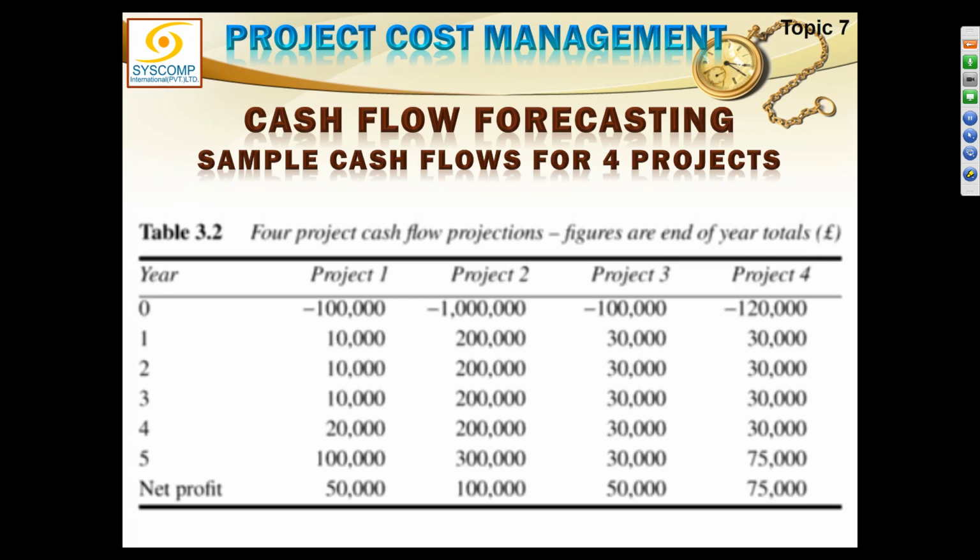And we will minus the cost. What is the total cost? It is 1 lakh. So 150 minus 1 lakh comes out to be the net benefit or net profit, 50,000. Got it? Yes, sir. So this is how we calculate the net profit.